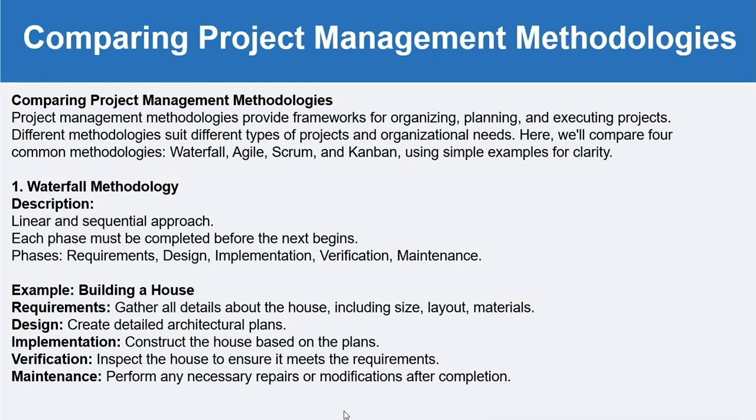So the first one is the Waterfall methodology. Waterfall methodology is a linear and sequential approach. Each phase must be completed before the next phase, and the phases are requirements gathering, design, implementation, then verification and testing, and then after deployment, the maintenance phase.